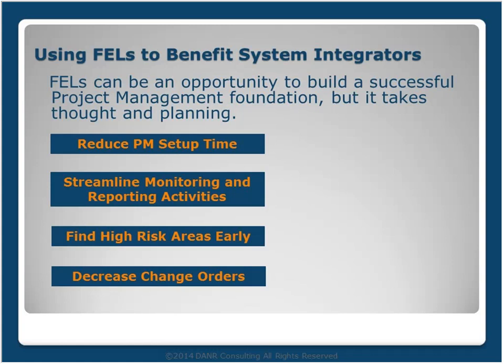Finally, FELs tend to decrease change orders substantially, and I've actually had integrators ask me in the past, why do I want to decrease change orders? That decreases my revenue in some cases. And the point is that you really build credibility with your client when you don't have change orders. And the shift isn't that you don't do the work; it's that you tend to do the work earlier in the process. So keep in mind that that's a real benefit to you as well.